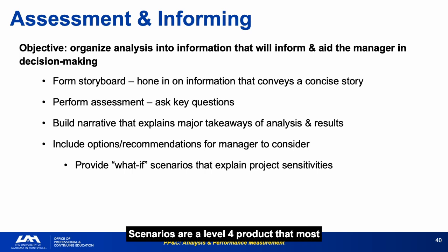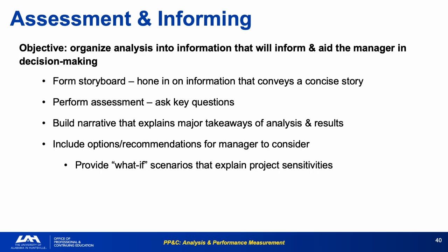What-if scenarios are a Level 4 product that most analysts skip. They require the analyst to model the sensitivity of the project to key assumptions, which is difficult but extremely valuable. If the information is not going to be well received, have the data ready to defend the position. Assessment requires both judgment and courage.